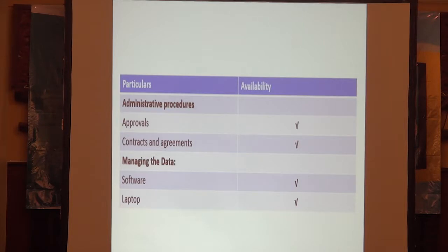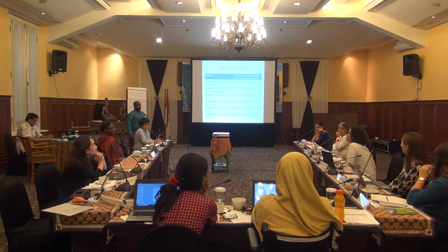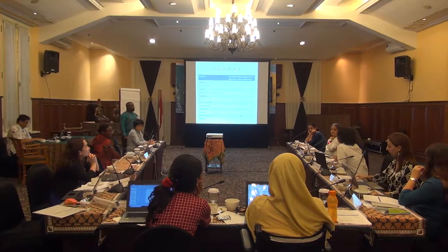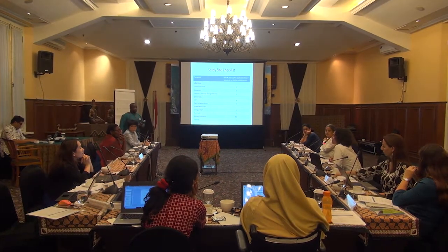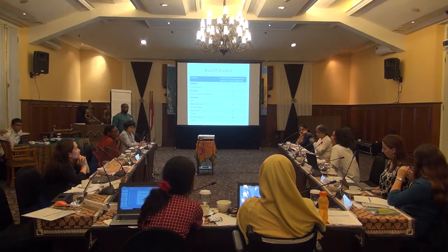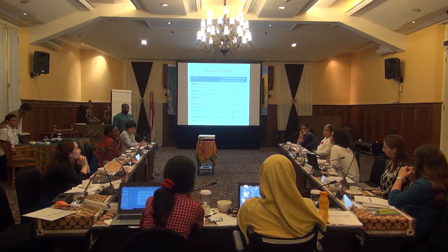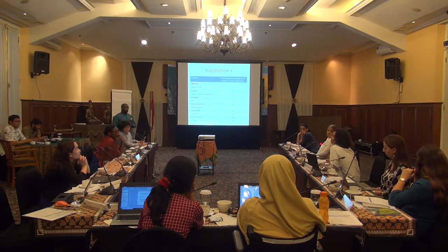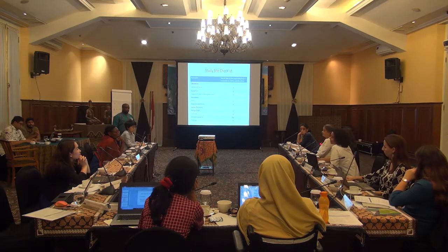So please, any comments, questions? Yes, Farah. Maybe you should consider having it. I don't know how it is in Ghana, but if you're going to a slum, maybe it's very dangerous for the study team. So you might need, for example, insurance for the study team, because anything can happen, and then who will be responsible for what happened to them?